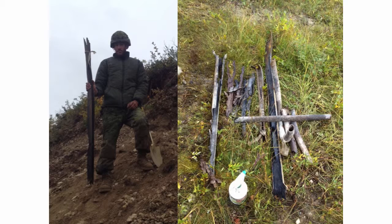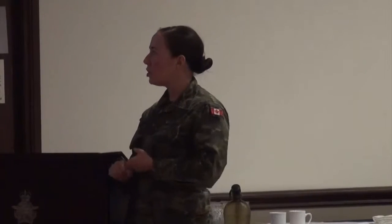And the third one, you can see it was opened up completely along the vertical axis there, as if it had been completely lined with explosives. So that led us to conclude that there's no reason those pipes that we hit with the cutting charge should have been destroyed, other than if there were still live energetics in it. So twofold revelations, I guess, on this one. One was that the procedure was working, that if there was anything live still left in here, this was going to take care of it.